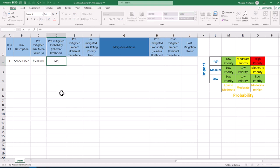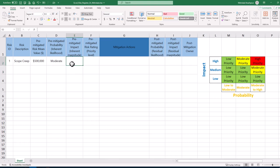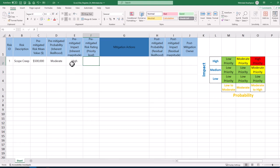The pre-mitigated probability or inherent likelihood is chosen from our risk matrix which is a 3x3 array in our project but can be 5x5 or even larger. Pre-mitigated impact or inherent magnitude describes the size, scale, or significance of the consequence that a risk event could have.